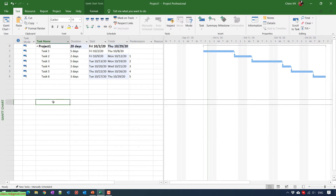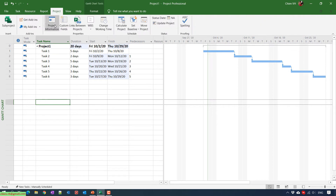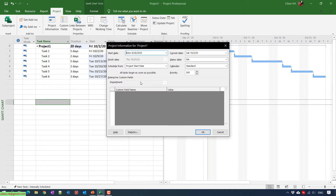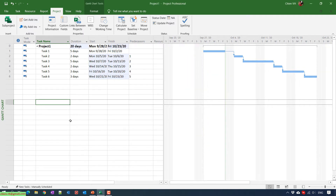I will be adding the start date for this project. Click on Project, then Project Information. For example, this project will be starting from the 28th of September 2020.